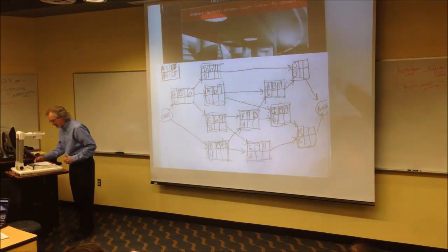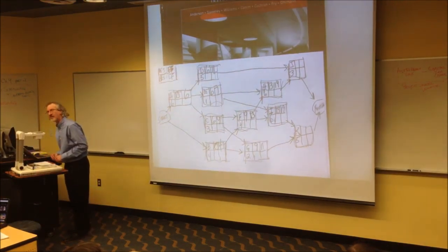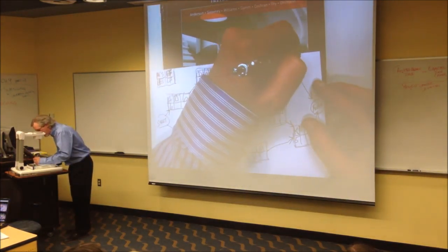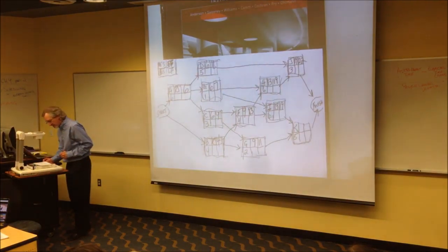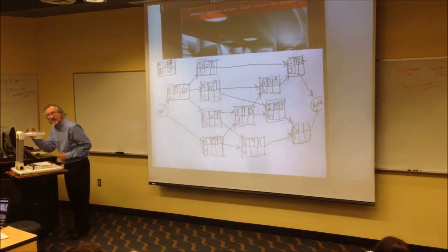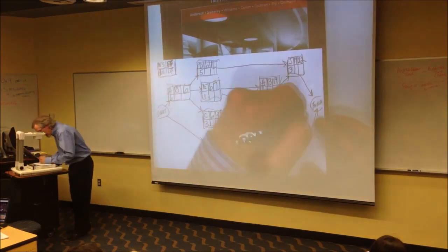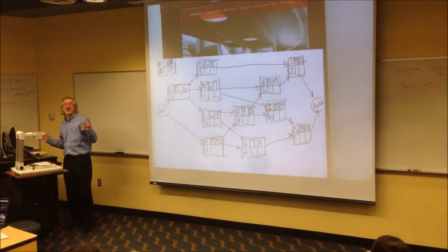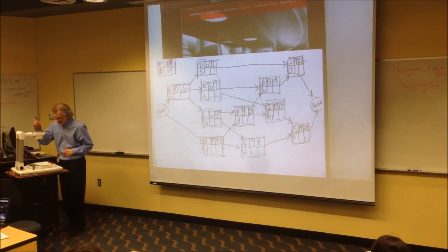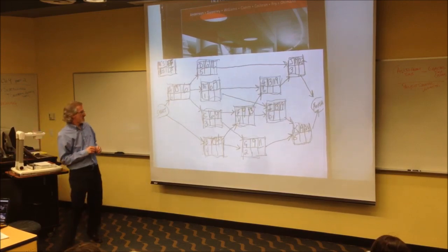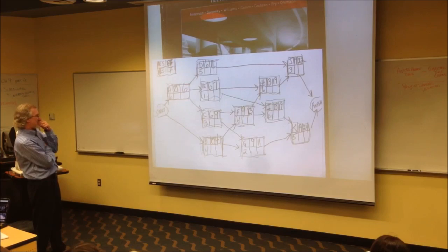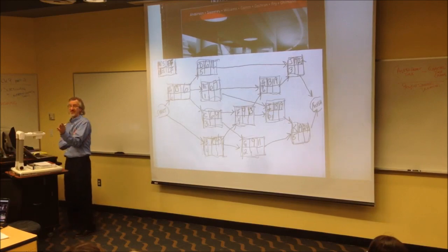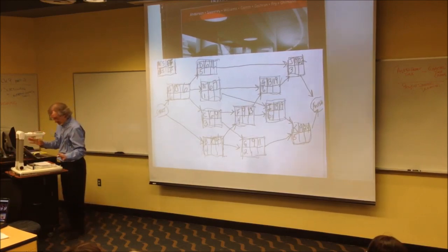19. H, I, J. Up here, J. Either a what or a what? If you're choosing the 19, add 3. 22. K. We either have a what or a what? 11, you're going with the 19, add 5. 24. Is that it? This project is expected to take how many units of time? Did we do something wrong? Somebody better check this. I thought it was supposed to be 23. Let's keep going. No, maybe it's supposed to be 24.